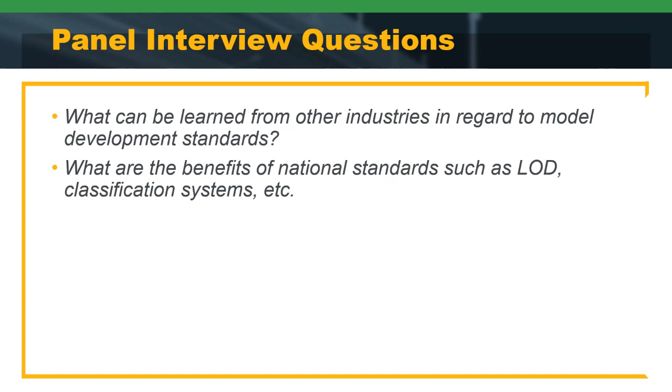But the benefits are so many, and it can apply to any type of project, not just the big projects, all the way from improved quality to improved change order avoidance. And that's the biggest item that we were able to quantify. The ROI that we were looking at in the study was an average of a factor of 3, and that is just with 6 benefits that we were able to quantify. How much you save depends on where you are in your maturity, how well you've kept up with the technology, how big your program is, and how you're using your information beyond construction.